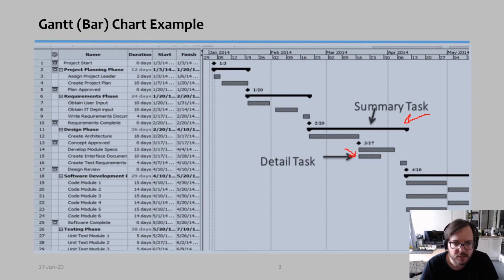Okay, in this case I'm using the software called Project Libre, which hopefully later on I'll create a video about how to use it. And this phase or this summary task basically allows me to say, all right, it's a summary of a collection of tasks. So for example, the one that I have here marked in the center is a collection of four different tasks inside of it, which are represented inside this area that I just drew.